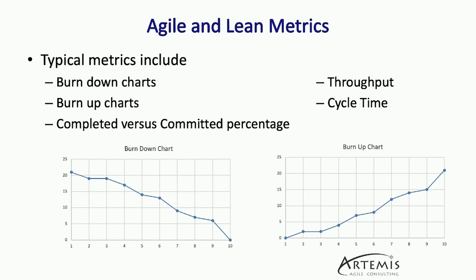A couple of good lean metrics to look at are going to be your throughput and your cycle time. Throughput is simply a measure of the number of items that were completed and delivered during that sprint. Cycle time is simply a measure of how much time it took from the moment you began working on an item until that item was completed and accepted. When you're looking at lean metrics like throughput and cycle time, one expectation is that those items are going to be about the same size, so you may need to do some normalization. This should encourage your teams to break down items into smaller pieces so that you can do more consistent delivery of value.